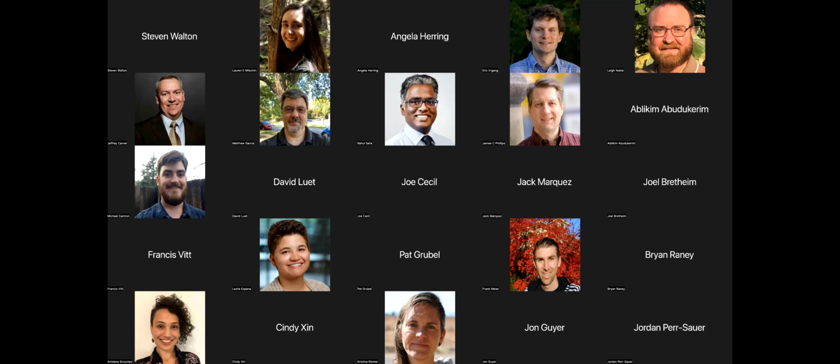It depends on the size of the project. So to me, the ideal size of a team is no bigger than 9. And if projects are very different, probably managing them separately is correct. But there is a concept called team of teams, which is a little beyond what we're talking about here. But I encourage you to read a little bit more about how to run team of teams or scrum of scrums. And that's really important because you can have 3 scrum teams and then have one person from each of those scrum teams form the next level team. And so that way they communicate all the way across a really big project, right?